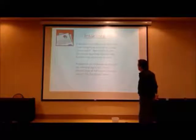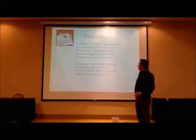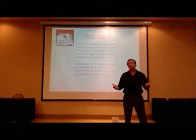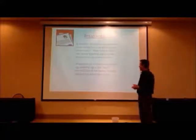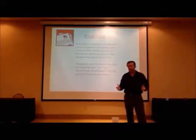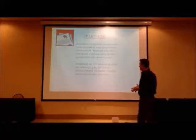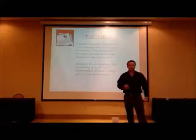A builder's risk policy is designed to cover properties while under construction. Make sure that when you're finished, a lot of insurance companies are going to want that to convert over to a vacant dwelling policy. Put up no trespassing signs. And if you have an open trench, again, a little common sense, get one of them orange fences and put it around so kids don't fall in there. You're never going to eliminate all of your risk, but you can minimize it.